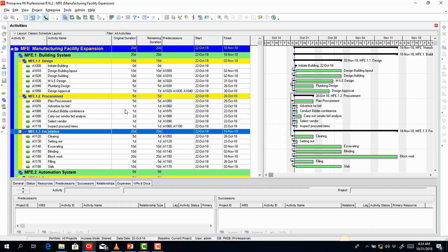So once you've created your relationships, the next thing you may now choose to do is to schedule your activities. Scheduling the activities would help in stretching out the relationships on the Gantt, so you see it in a much better format, and it will automatically help you to display the activities that you have on your critical path, and also give you some other very interesting information.